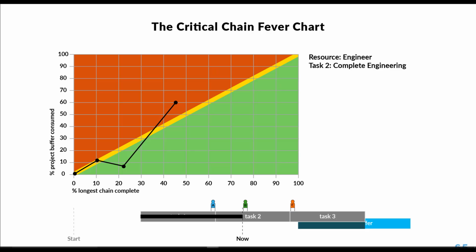It's very important to note here that red is not bad. It is in fact a very useful means of providing some feedback from the system. Remember, this is like a relay race. Nobody wins until the last person crosses the line. It's not the fault of the engineer that this task is running late. We fully expect half of the tasks to run late if we have been given P50 estimates.